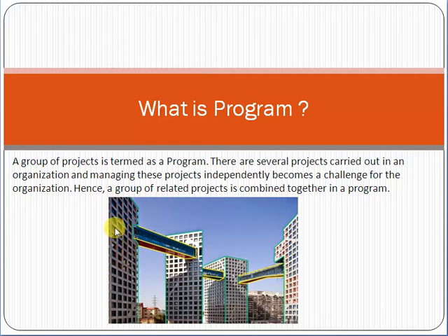Why? Because try to understand that as a whole, this is one hospital, and the development of each building is a project, and these projects are interrelated with each other. Interrelated means that resources from here can be moved here, they can work here, they can work here. Every building has its own budget, but overall the budget is being provided by only one hospital. So as a whole, we see that it's a program.